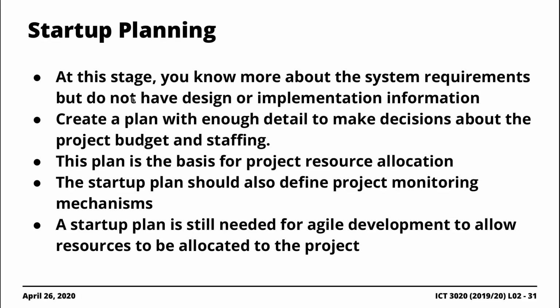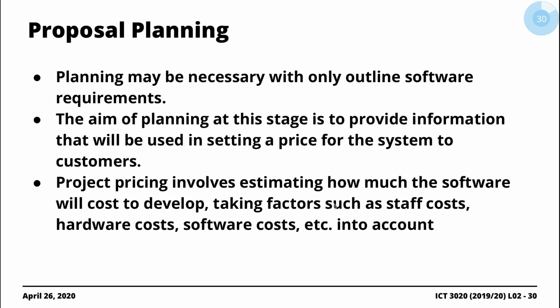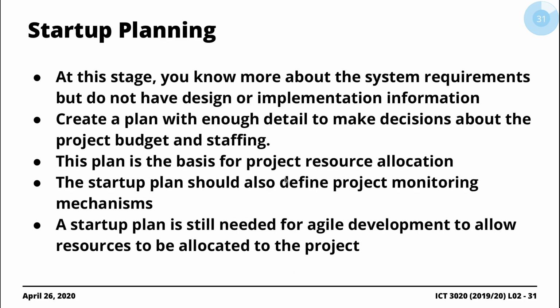And really, the startup plan is what forms the basis for resource allocation to the project, right? At this stage, if you came up with an estimate to say you need 4 developers, maybe at this stage you'd have firmly decided that in actual fact what we need is just 2 developers or 3 developers. It should be enough for us to successfully implement this software project.